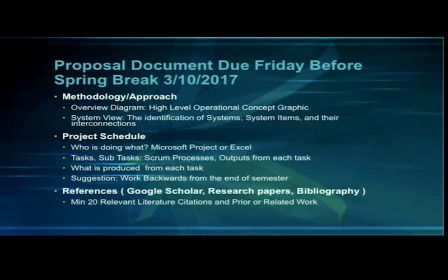So figure out what the exact output is from each of the tasks, so that you know what's got to happen next. If you do it up front and manage it, you do a good job the first time, it'll really help you instead of being something you just have to go back and do all the time. Okay? Use it to your advantage.